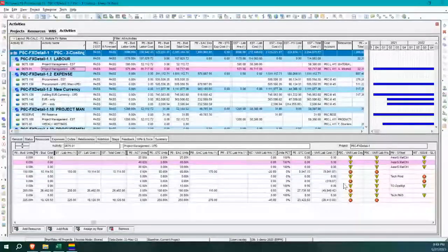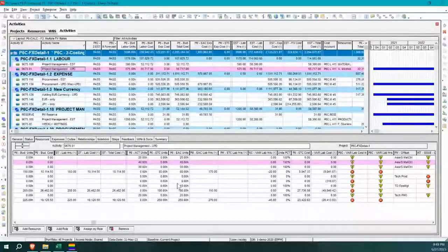Now, another thing that we do in Calculator, we have flagging. Now, this could be in an integration, or it can be a utility that runs. Okay, so flagging is always very important, particularly in an integrated environment, because you don't want your schedulers just to have all sorts of stuff coming into their system and they don't have an easy way to see that something new has occurred.